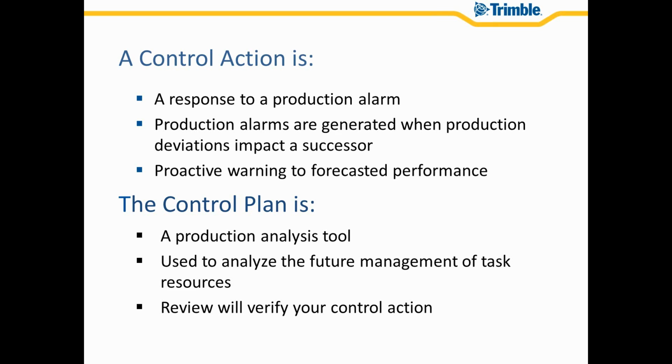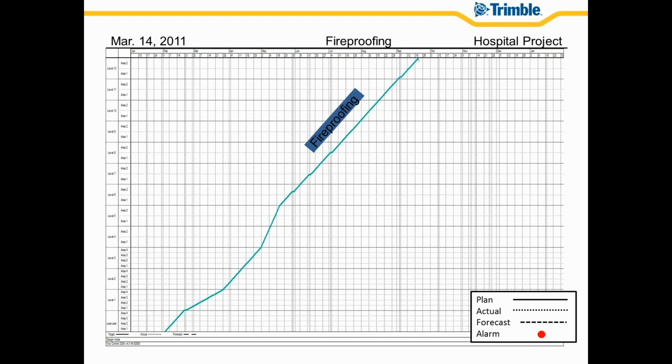All right, another flow line example here. Now we're moving to the interiors phase of the hospital tower. We start at lower level through level 12. You'll notice that lower level to level 3 has 4 project locations, and that's because of the floor template, which included another auxiliary building, not the SMOB, but another auxiliary building attached to the tower. As we move through the upper levels from 4 to 12, the floor plate is then split in half.